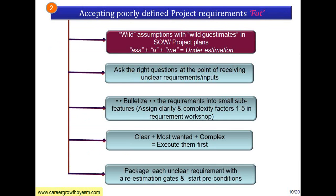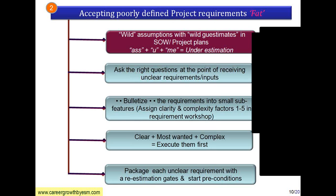When someone gives you a one-line requirement, make a set of questions and ask the right questions at the point of receiving unclear requirements — not afterwards, not after starting the project. You will get answers; then write the requirement yourself and send it back to the customer for approval. Another option is to bulletize the requirements into small sub-features, and for each sub-feature assign clarity and complexity factors.